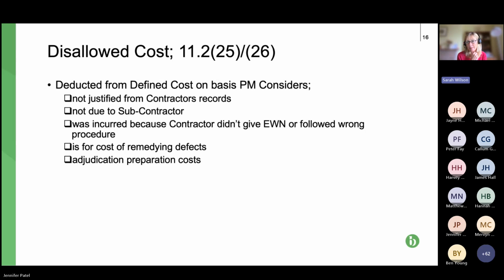Now, that makes sense. So, if you're talking about claiming the cost of an individual on site, we talked about the schedule of cost components, how we would work out their daily or weekly rate. But we then need a timesheet basically to explain what they have been doing over the week, whatever period we're talking about.